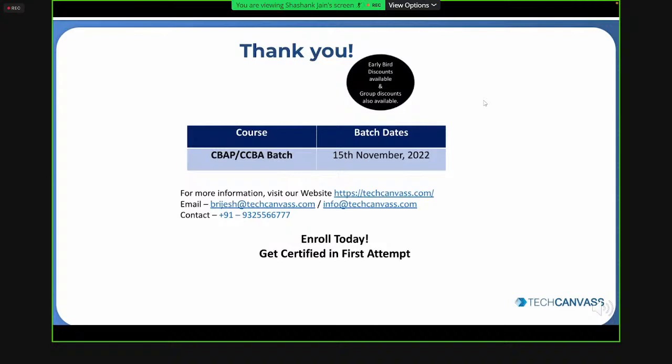So you can work upon creating a stakeholder map where you find out which stakeholders are highly influential, which are having a lot of impact on the program. And accordingly, you work with that stakeholder. So you can prepare a stakeholder matrix and place such stakeholders into that matrix, that who is highly influential and who is highly impacted. Because if those kinds of stakeholders are there, you have to work with them quite closely because you need to get their agreement and support for the change.